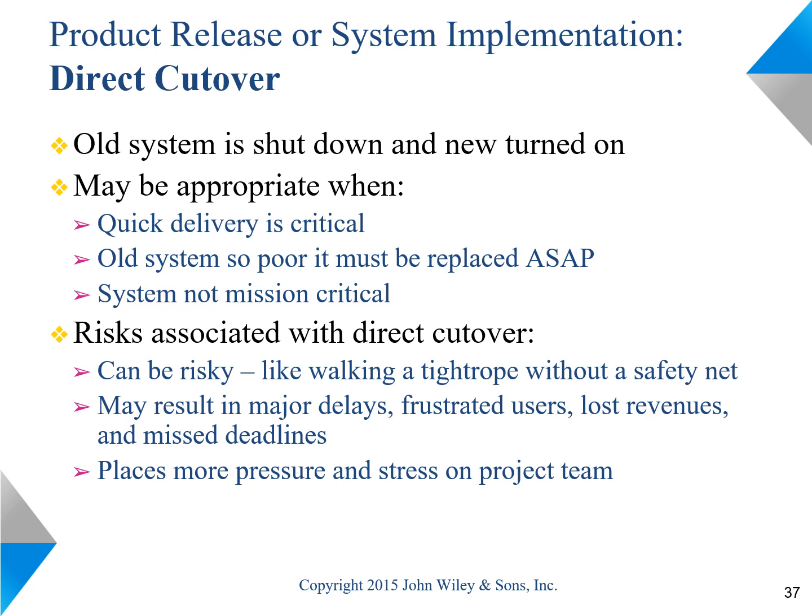Maybe it's at its end of the useful life and it has to be replaced as soon as possible. And this may also be appropriate if the system is not mission critical, because the risk associated with direct cutover is pretty high. You don't have much of a safety net.